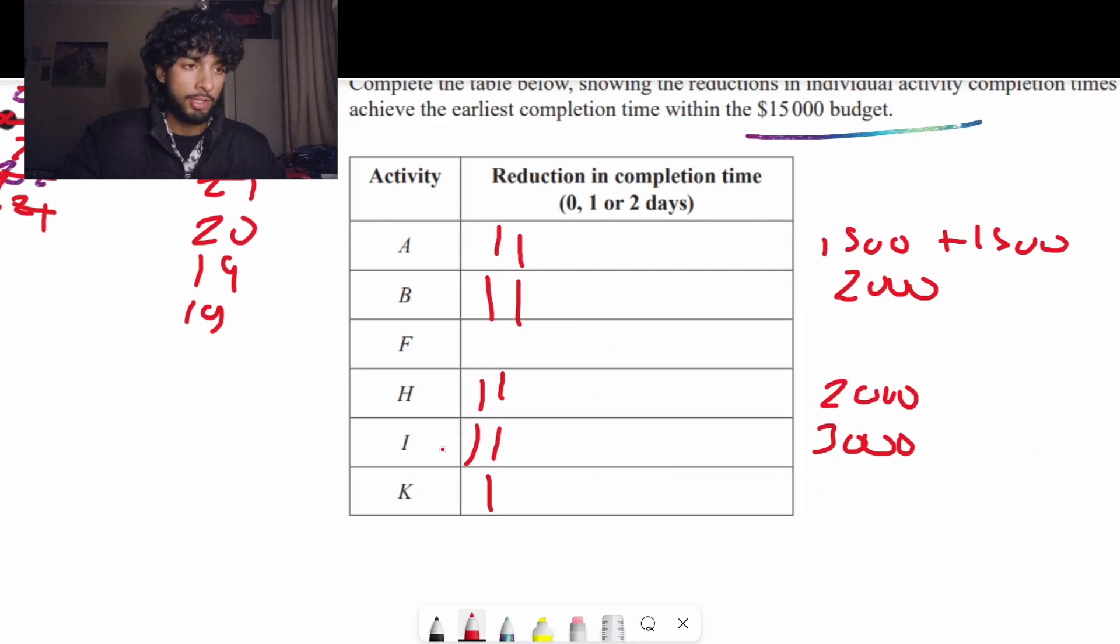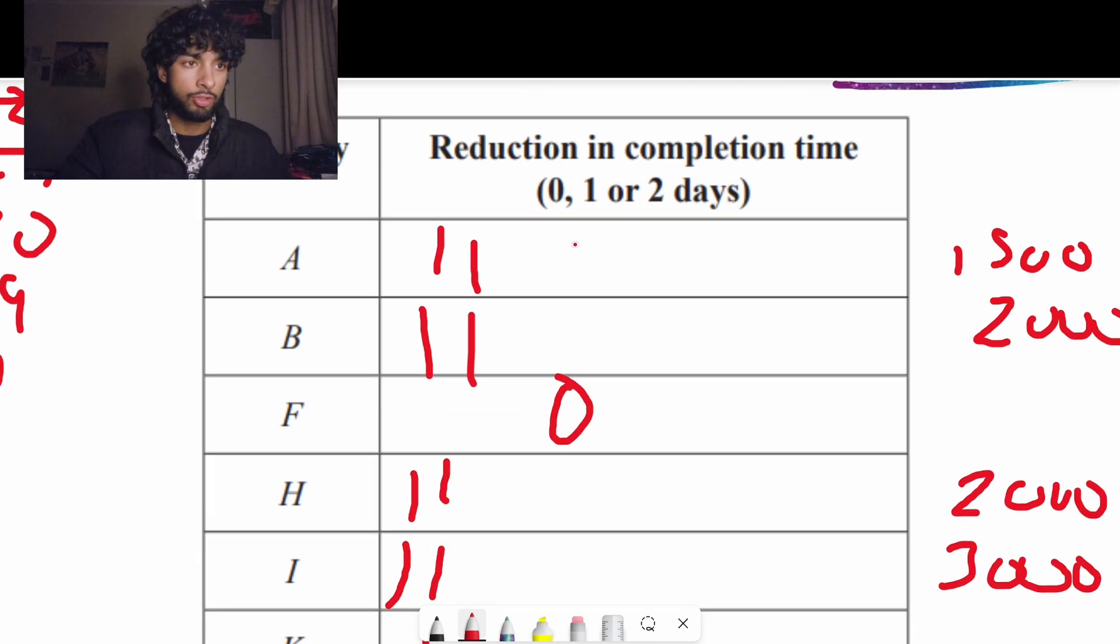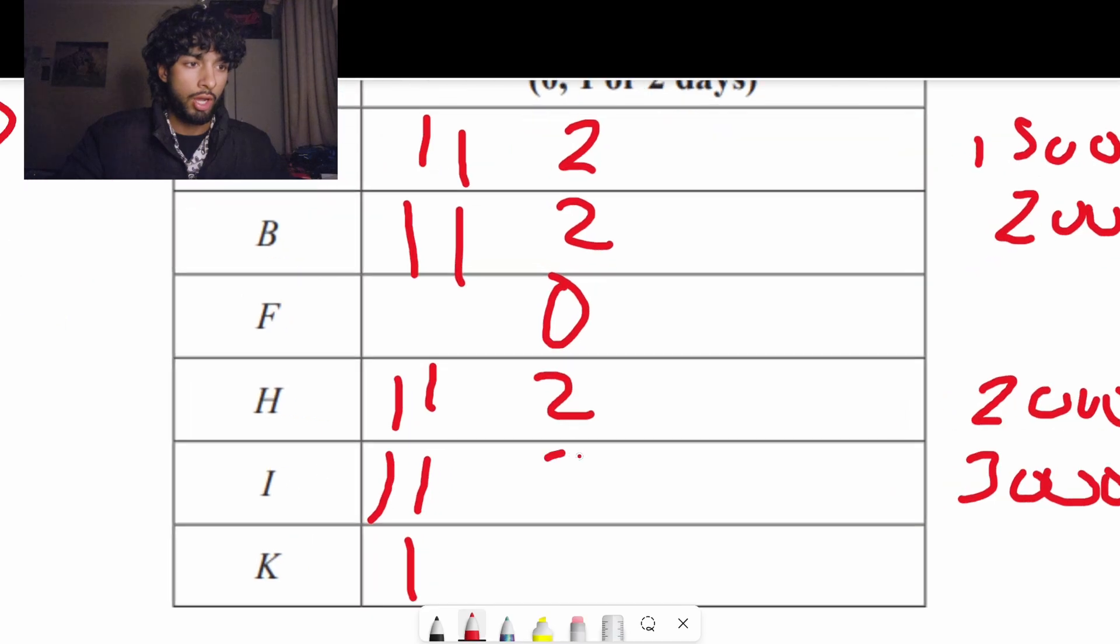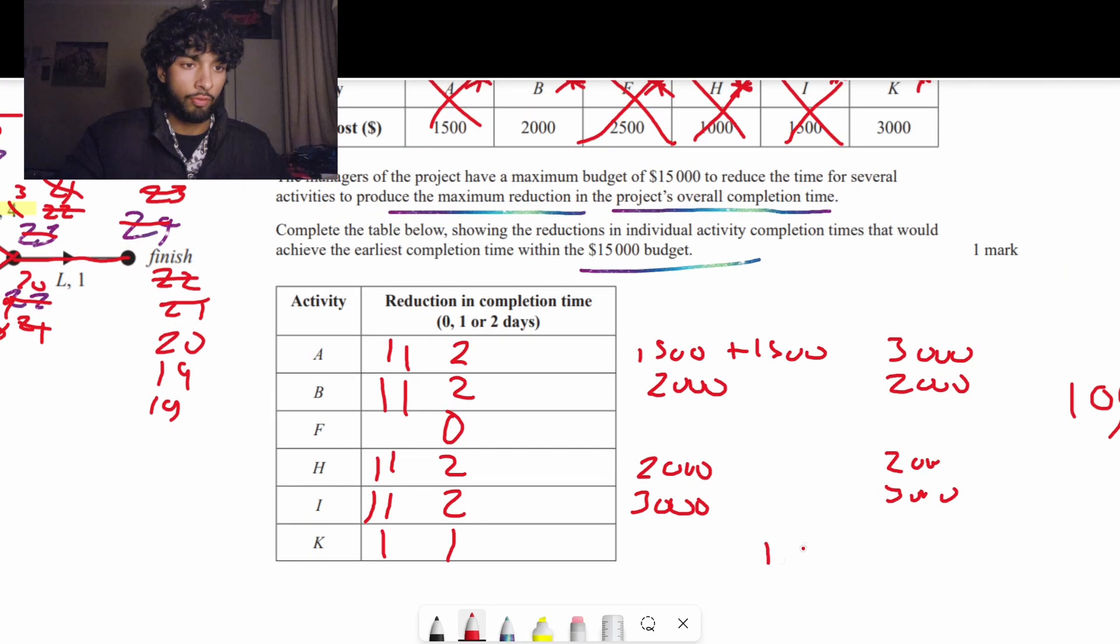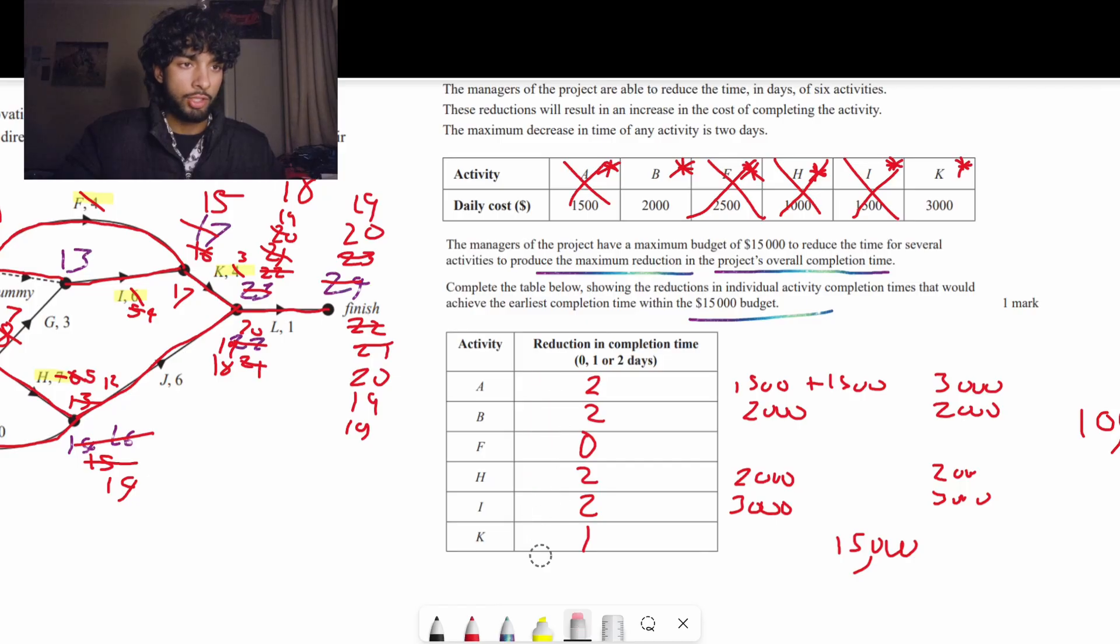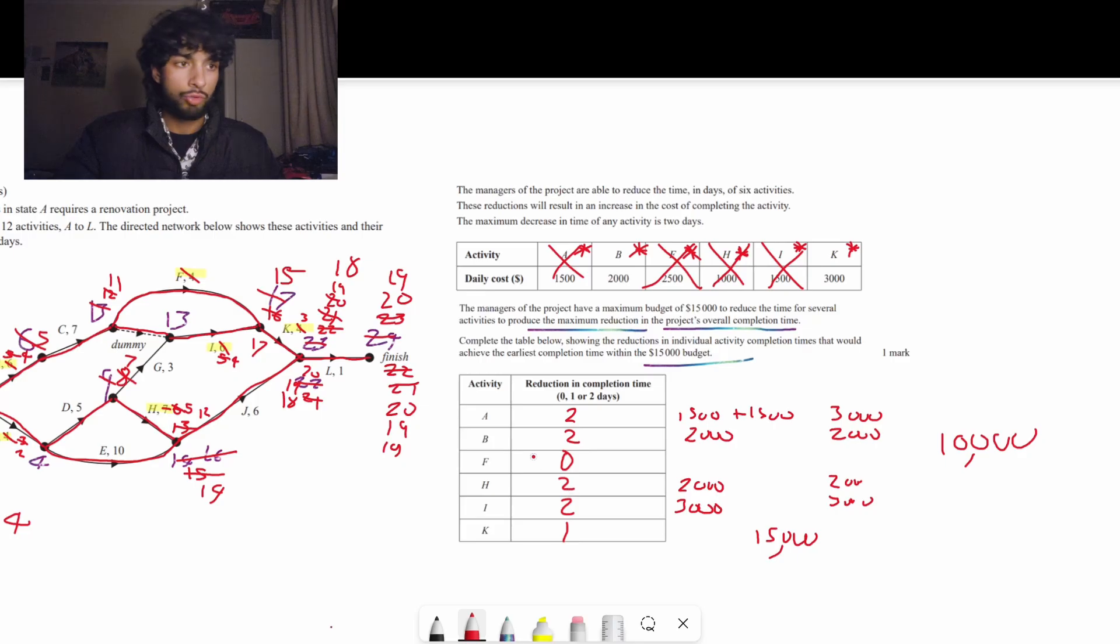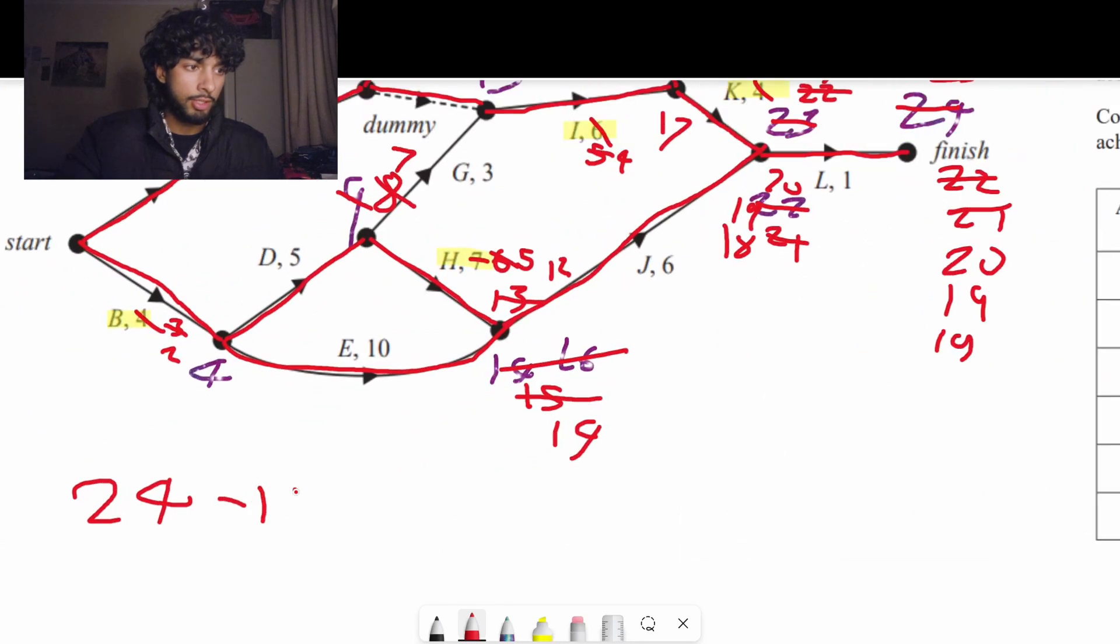So this now becomes a 2 and this now becomes a 3. That means that this 15 becomes an 18, then this 18 becomes a 19. So the overall completion time looks to be 19. We'll double check. 2 plus 5 is 7. 7 plus 5 is 12. And 12 plus 6 is 18. 18 plus 1 is 19. And we went from 24 to 19, which is an overall reduction of 5 days.